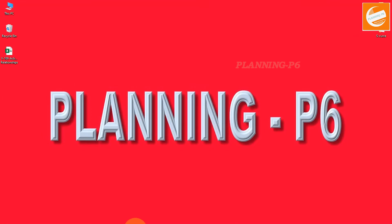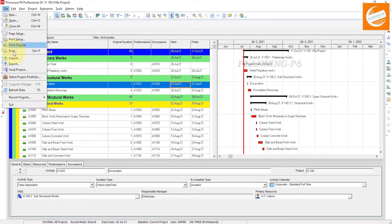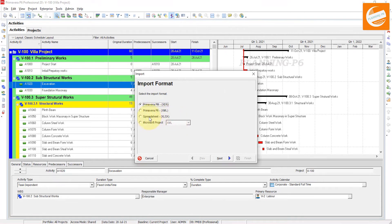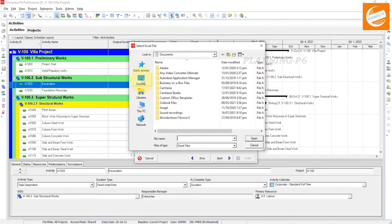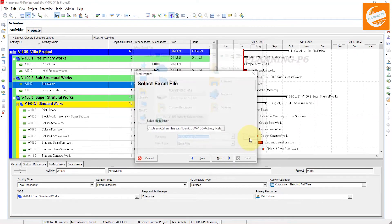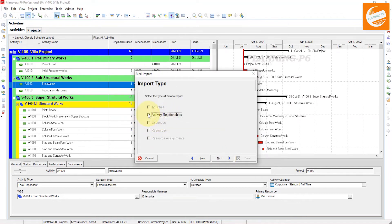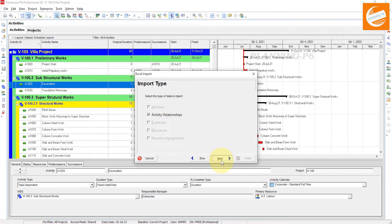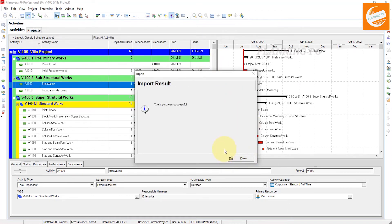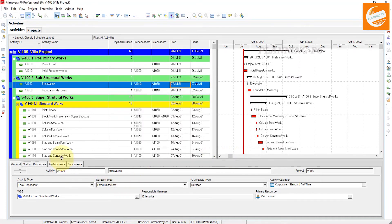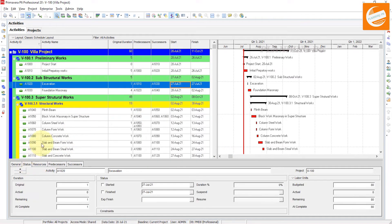After closing the Excel file, go back to Primavera and choose File > Import > Spreadsheet XLS. Click Next, select the file from the Desktop, open it, click Next. You can see the file contains only activity relationships. Click Next, confirm the import action and target project, then click Next and Finish. The import was successful — close that dialog.